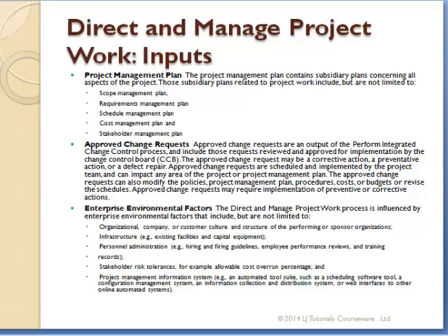Now then also we bring in approved change requests. Most likely on a project, changes will be made regularly. Assuming someone leaves the team, maybe one of your project team members will leave the team. So now you're leaving a slot on your project before you can hire the next person. It will take about a week. So it means you're going to change the timeline of your project now. Such change, and you're going to shift some activities.